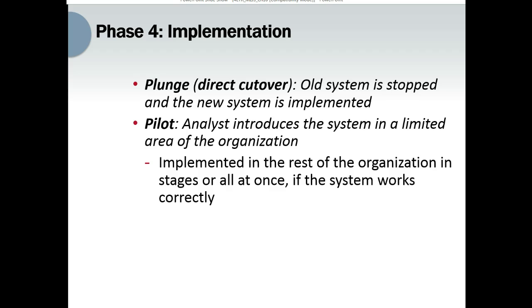And then the pilot conversion, the analyst introduces the system in only a limited area of the organization, such as maybe part of a department. If the system works correctly, it is implemented in the rest of the organization in stages or maybe all at once.